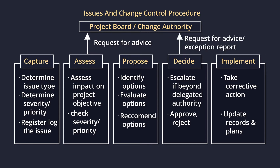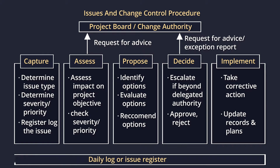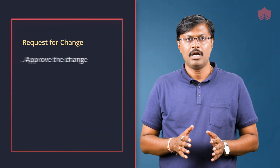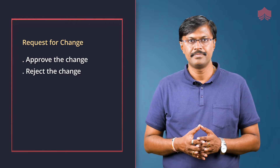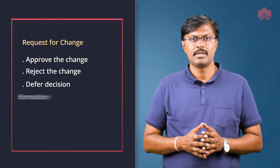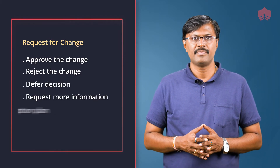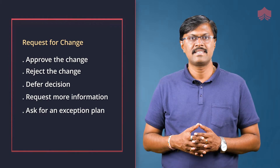During the decide step, minor issues may be resolved by the project manager. Other issues will need to be escalated to the project board. For a request for change, options are: approve the change, reject the change, defer the decision, request more information, or ask for an exception plan.